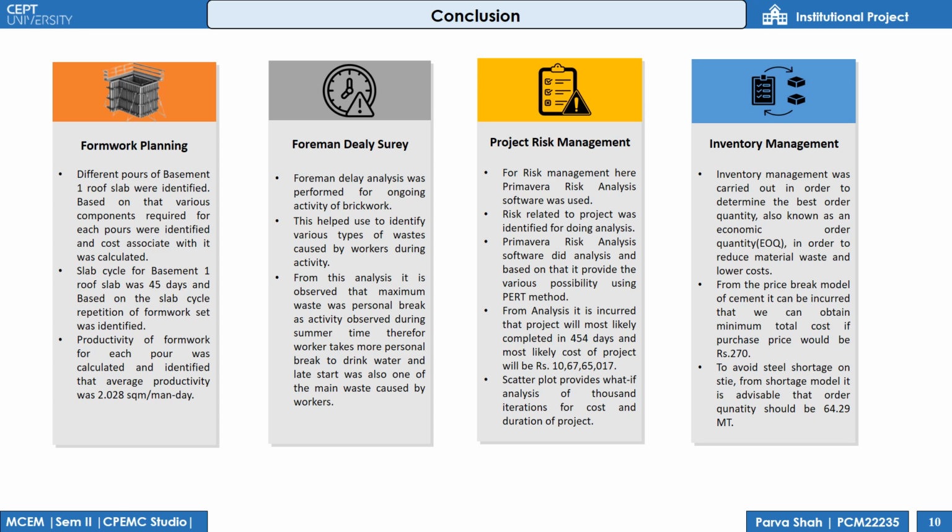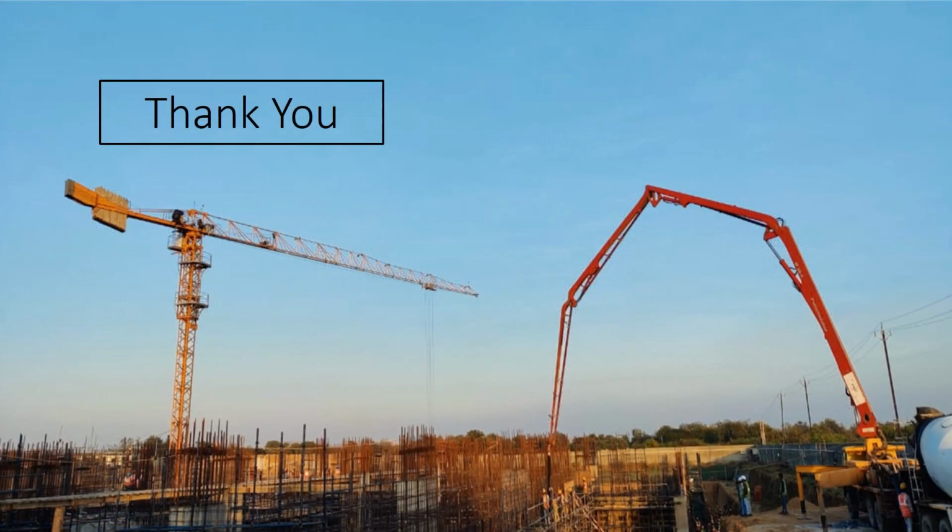Inventory management. Inventory management was carried out in order to determine the base order quantity, which is also known as economic order quantity, in order to reduce material waste and lower the material cost.